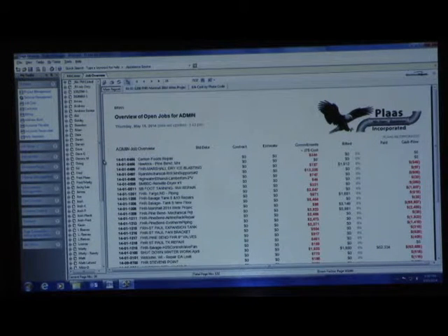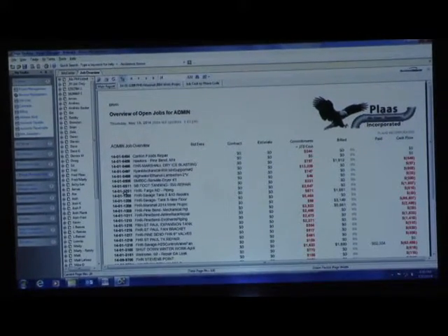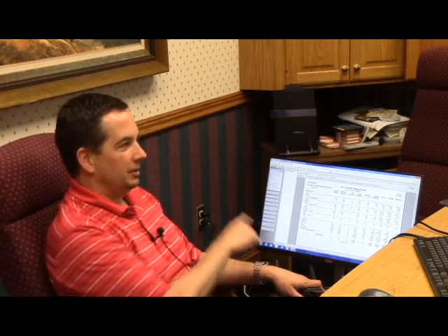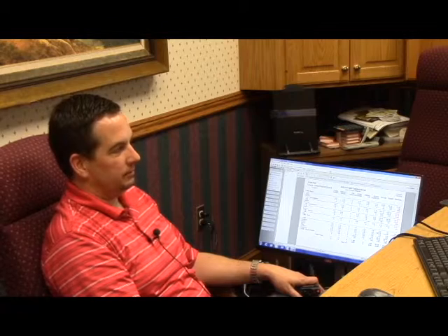But yeah, I definitely like to set it up where I just pull up just the guys in the south projects. I don't need to see what they're doing up here. Well, you have to go back and close all those old ones. If you enter the estimate at the start of the job, then you can say these are the codes we want to code to and track it. It's hard to come in after it's done and say, how do these numbers relate to these numbers if nobody was trying to make anything match along the way?